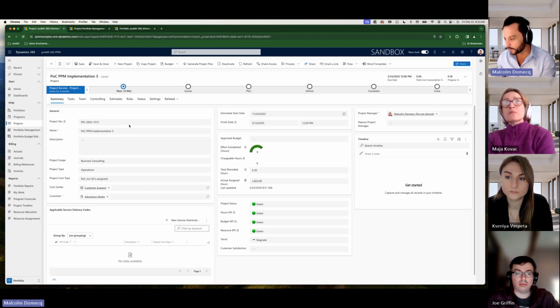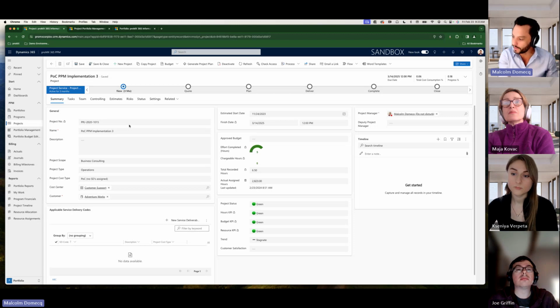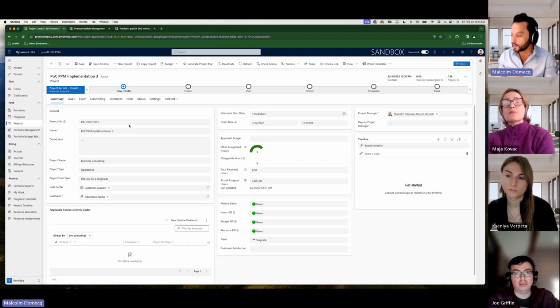So that part, we go back to the 80% to the 100% of the solution. We leave it for us to have a conversation with the customer and to finalize the implementation configuration to their particular needs. Not everybody goes about the same way in their businesses and how they modify the budget. They might say, keep that as a baseline of the budget and then create another budget, increasing the $2 million.